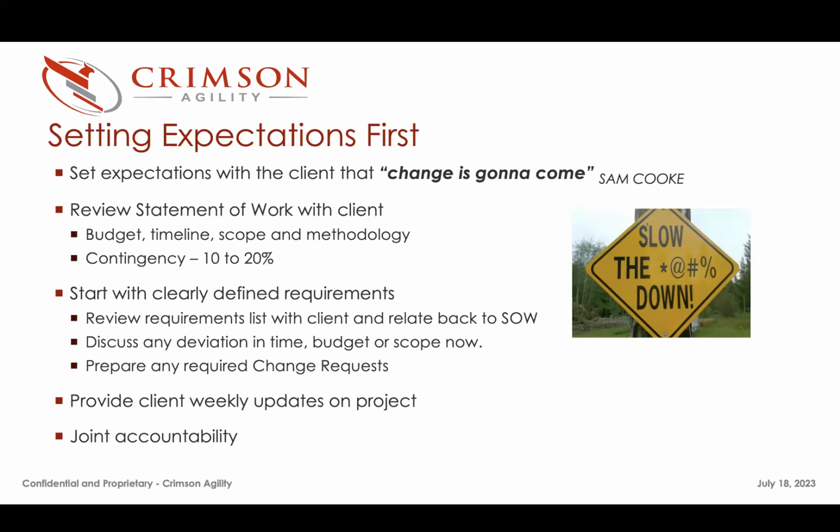The client should plan for 10 to 20% contingency. I think most of the smart ones do. They understand that a project like this, there is going to be change. There are going to be things that they want to do that they never thought of before. There are going to be things that we come back and tell them are more complex. And so most larger, more mature clients will plan some form of contingency. If you make the assumption it's there, it makes it a little easier to have that conversation. But